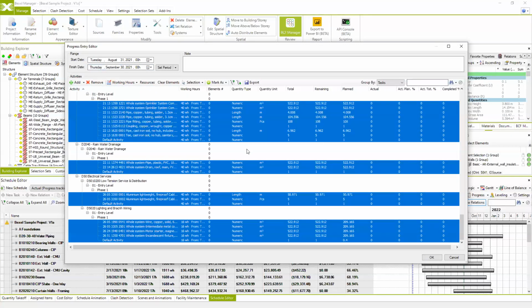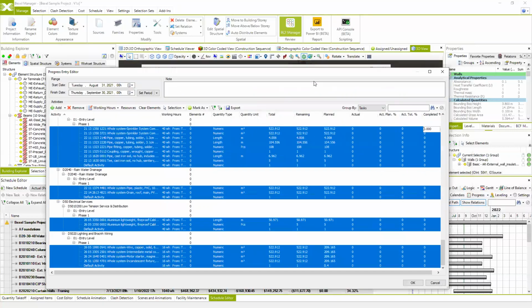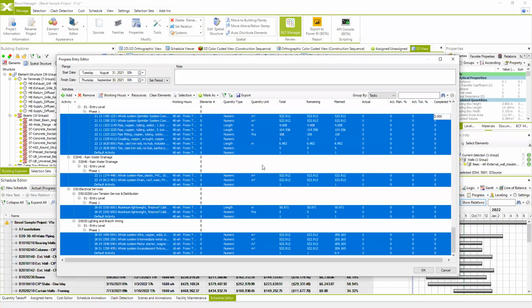And then if we do not have the information from the site, we can manually input the progress here. But this is again some kind of workaround, because how can you input the progress if you don't have any information from the site? The other way is if you are using the BEXEL Manager as a platform on site and input the progress right here. So this is the good way. Here you can specify the percentages of completed work in this period of time.